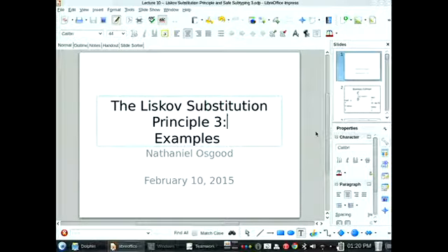That's great. So how long will this take? If T2, T3, T4 are all independent, how long will it take to finish then? 14. It's actually the max of these, because these are going on in parallel. It'll be much easier if I drew it out properly here.